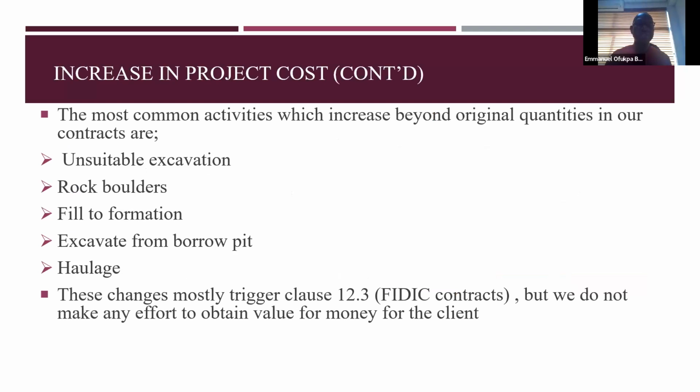The most common activities which increase beyond original quantities in our contracts are unsuitable excavation, rock boulders, failed formation, excavate from borrow pits, then haulage. These changes mostly trigger clause 12.3 in our FIDIC contracts. Mostly our projects are based on FIDIC contracts. But we do not make any effort to obtain value for money for the clients.